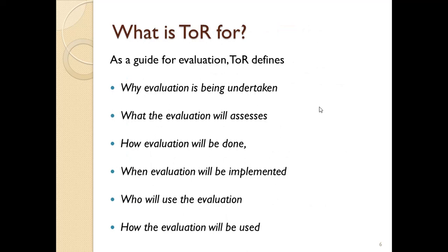So why do we need terms of reference and what are they for? Of course, as a guide for evaluation, terms of reference define why evaluation is being undertaken. And therefore, in this case, defining for those who will carry out the evaluation what the evaluation will assess, how evaluation will be done, in terms of methodology and different approaches, when evaluation will be implemented, so that the evaluation team can know in advance when certain evaluation activities should take place according to the plans of management.